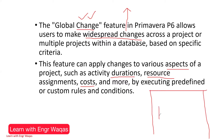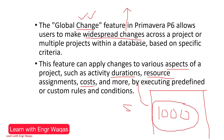Let me give you an example. Say I have a project schedule with 1000 activities. A new change request comes from my consultant, client, or inner team members: I need to change the duration for all 1000 activities by five days for every activity. If I update them one by one, I would feel a lot of pain. But Primavera P6 will not leave you alone in that situation — it provides the Global Change feature, allowing you to automatically update all 1000 activities in a single click.